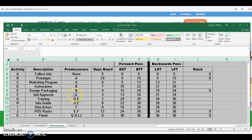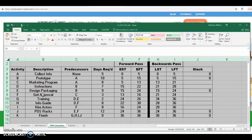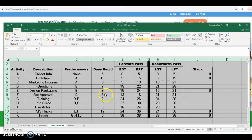This is where we start getting a little more challenging. Activity F is a predecessor for activities H, I, and J. So the finish of activity F must be in time for the earliest of those three activities to start. Looking at the start times for H, I, and J, the earliest one is day 24. So activity F must finish on day 24, and subtracting the three-day duration, it must start on day 21.